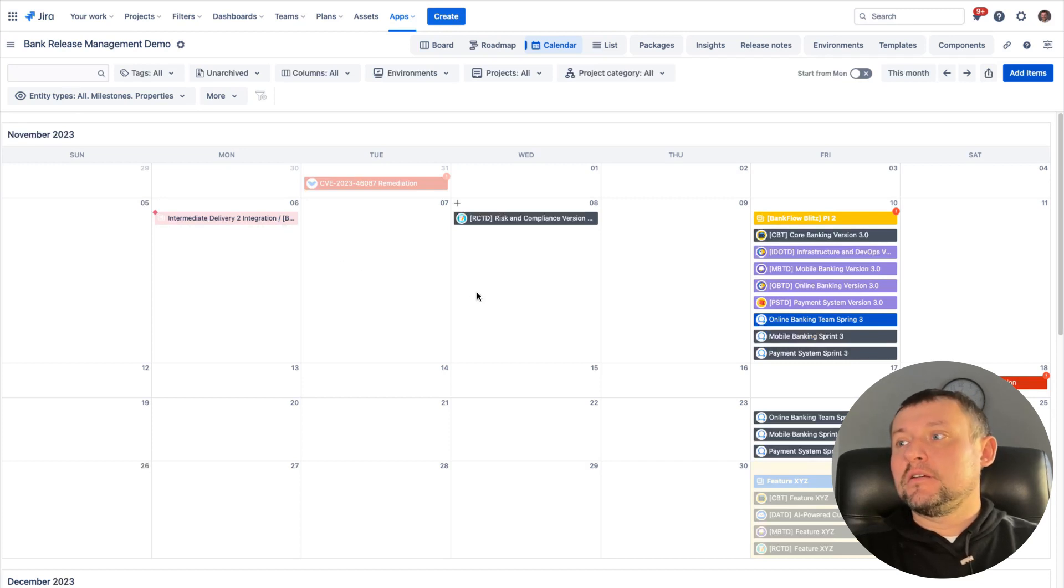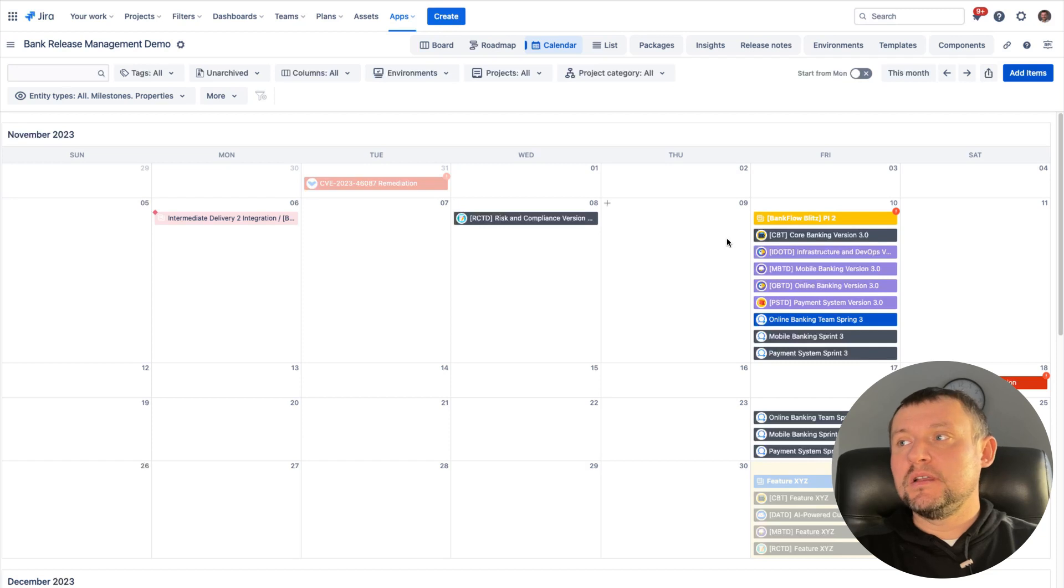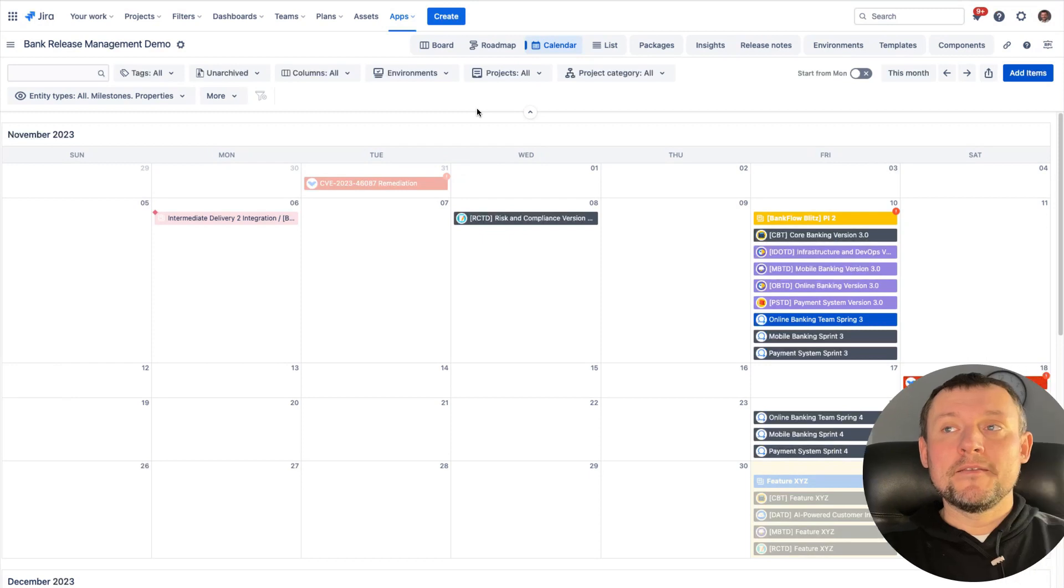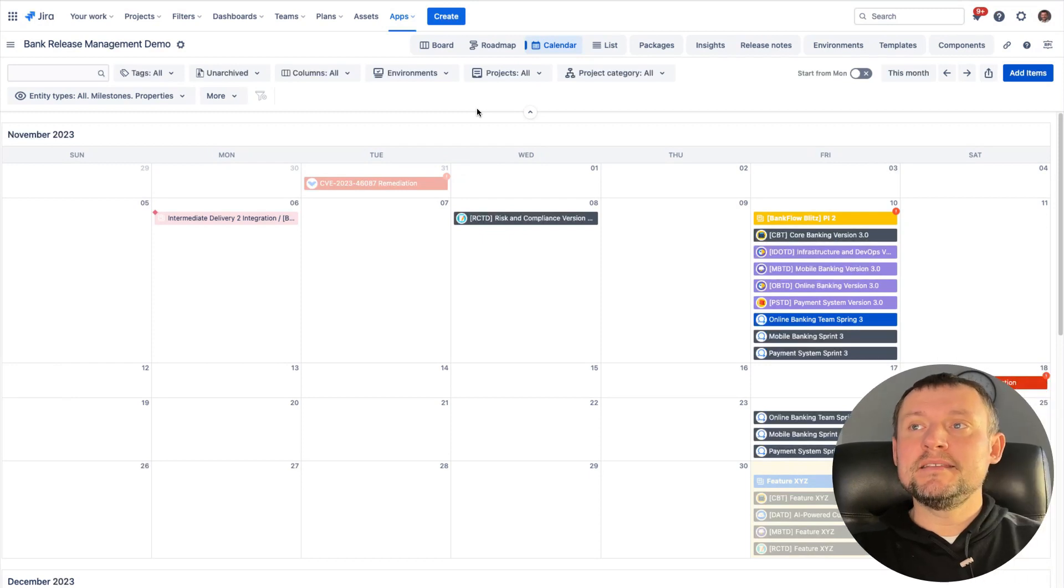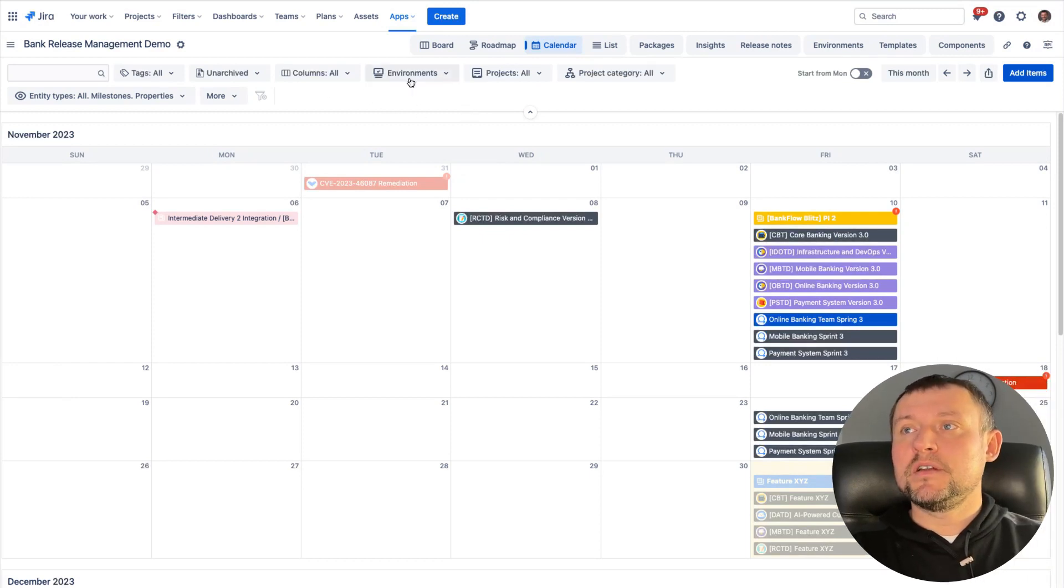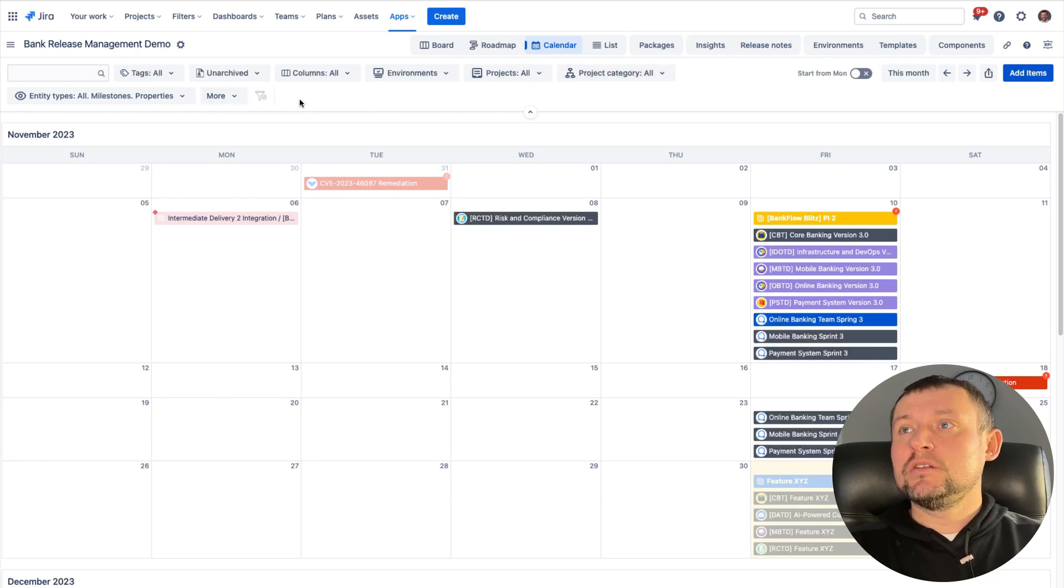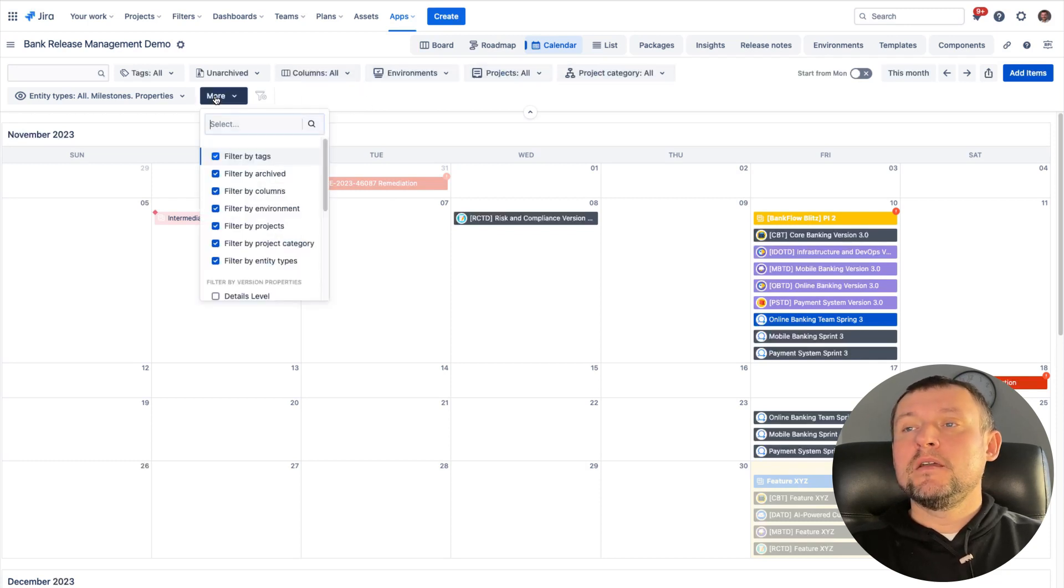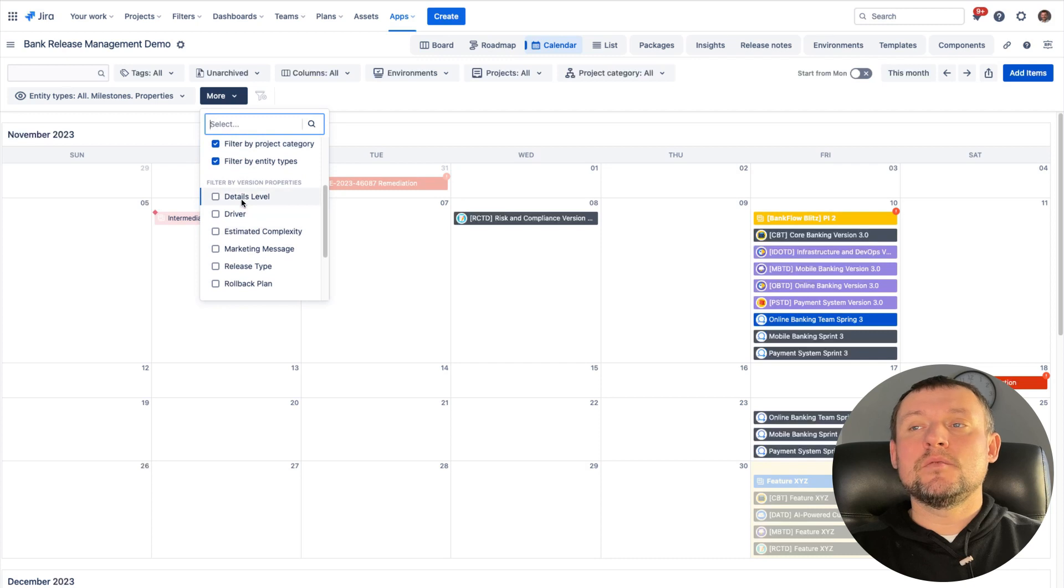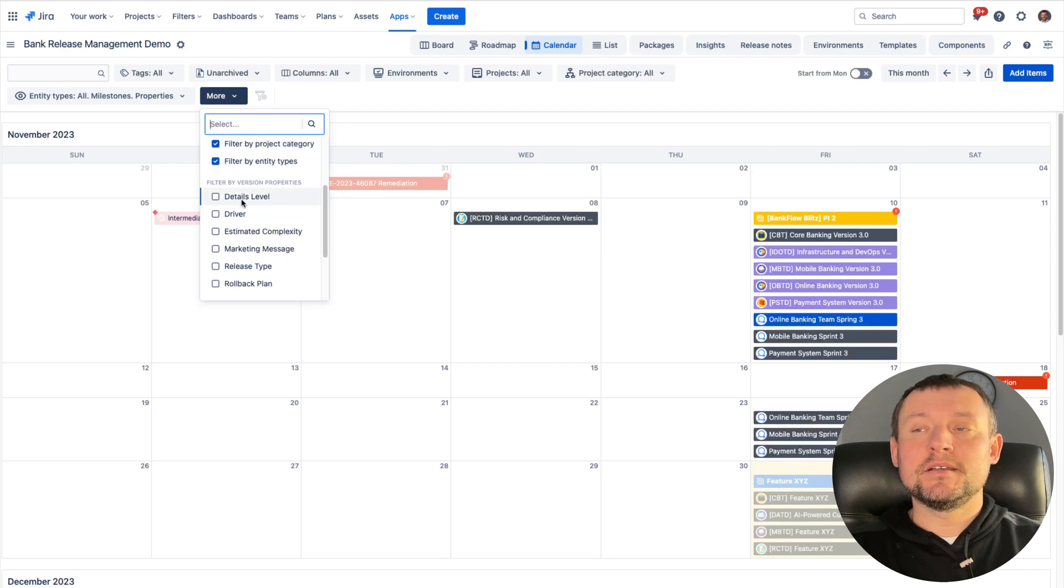And in addition, if some event is delayed or supposed to be delayed, we can see the attention mark to see how long the item will be delayed. This view could be easily refined by using filtering capability. You can see a lot of different type of filters. And in addition to standard ones, we can filter by any custom property which is connected to the release.